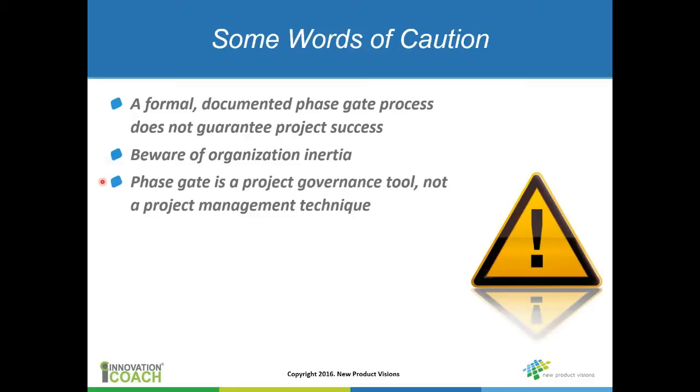Third, and I think maybe this is probably the most important point to remember, if you don't remember anything else from this webinar, is that phase gate is a project governance tool. It's really meant to give senior management the opportunity to look at a portfolio of projects, but it's not a project management technique.